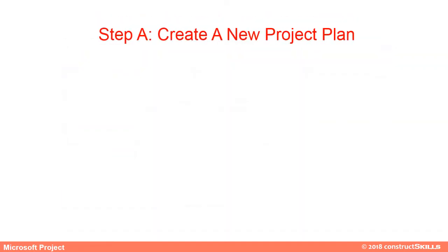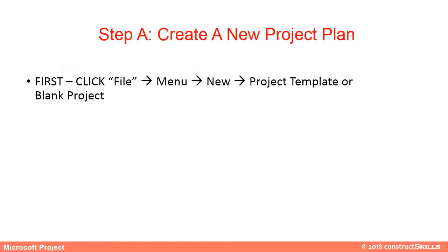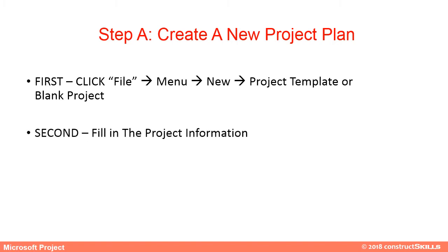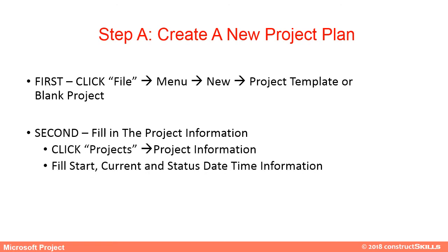The first step is to create a new project. Select File menu, then New Project Template or Blank Project. Before listing tasks, fill in the project information, which includes project name, project start and finish dates, current date, and status date.